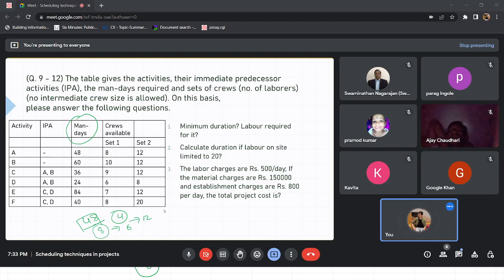Let's suppose that, to make a brick wall, one mason requires one labor, or for calculation purposes, let's say each mason requires 2 labors. So if you have a set of 3 complete, then and only then you can move forward. If you have 2 masons and only 2 labors, again you will say there are 2 labors less or one mason extra. This kind of situation does arise on site, and at that time we actually break it down into different components.